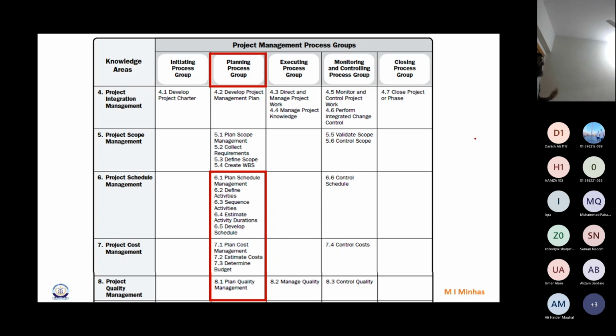And if it passes, then what? Now here, we call it a deliverable, and if it passes, it will be called a verified deliverable. The QC pass, right? Verified deliverable. And if it doesn't, then we'll send it back for rework. And rework would require extra budget that would come from the management reserves, otherwise you will get that from the contingency reserves, if you have kept that contingency. Is it clear? So rework and then come back, or directly verify. Once verified, we would like to call the customer, right? Come, your doors have arrived, or we have prepared this, please come and visit us.